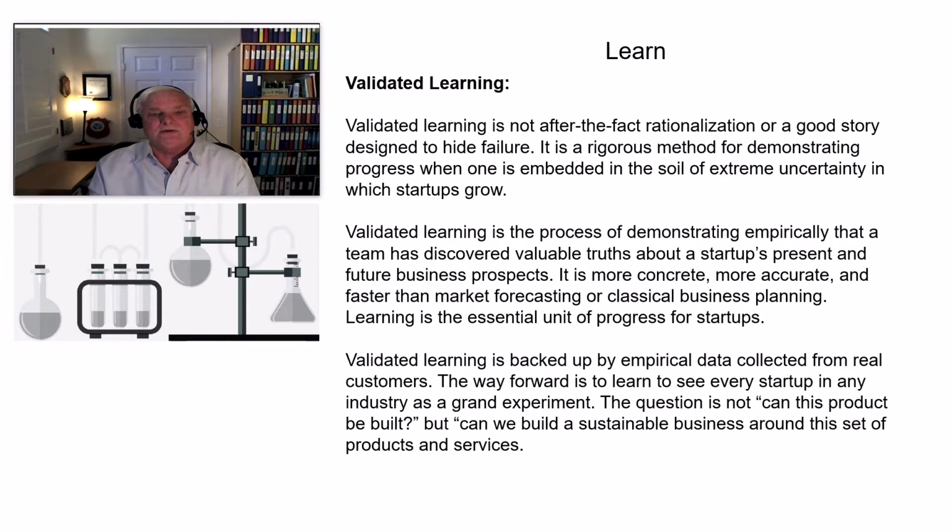You've got a rationalized method for trying to create what he refers to as empirical knowledge that you demonstrate. And this is something that's very different from a traditional company that might run an entire project and then say, now we want to capture lessons learned. What did we do right? What did we do wrong? You're not capturing it at the moment. This is talking about empirically capturing things as they're happening, documenting them. The philosophy of an experiment is that you watch, you keep your eyes on what's happening, and you, in essence, are telling other people around you this is working or it isn't, or what's happening.